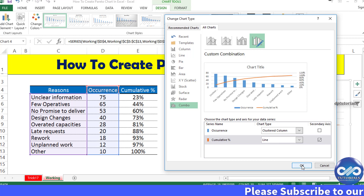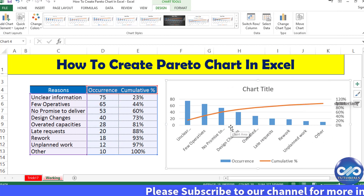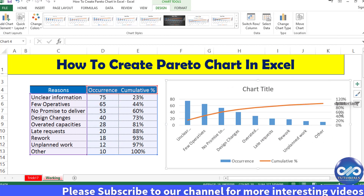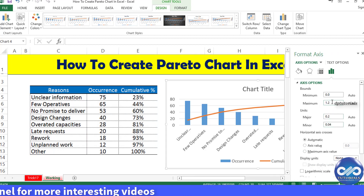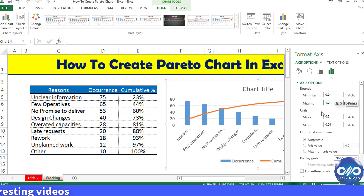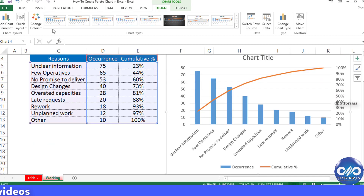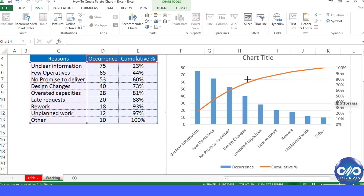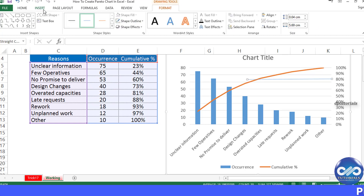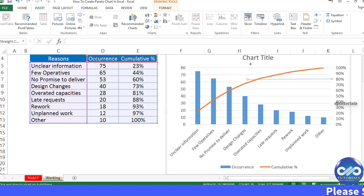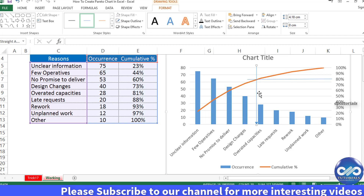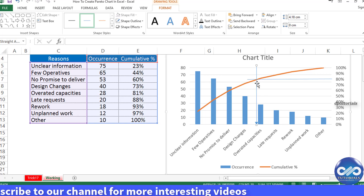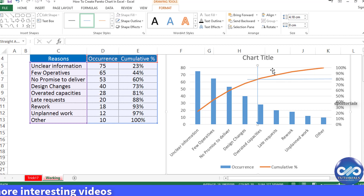Now your Pareto chart is almost ready. Adjust the vertical axis so that the maximum value is 100% — set it to 1 as the maximum. Further, draw two lines bisecting 80% on your vertical axis and drop a vertical line from this intersection point, so that you will notice all the values on the left side of this line are the reasons affecting your project.